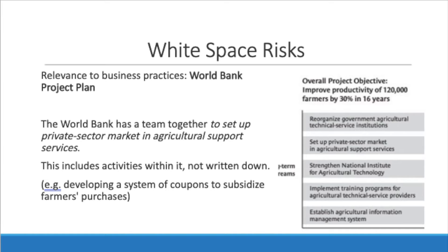As for how this is relevant to today's business practices, the article gives the example of the World Bank project plan. The goal was to improve productivity of farmers, so they set up groups and teams. One team was called to set up a private sector market and agricultural support services, which is shown in the image on the right. This is a white space risk because activities within it are not written down — for example, developing a system of coupons to subsidize farmers' purchases is within this group but not written down anywhere.